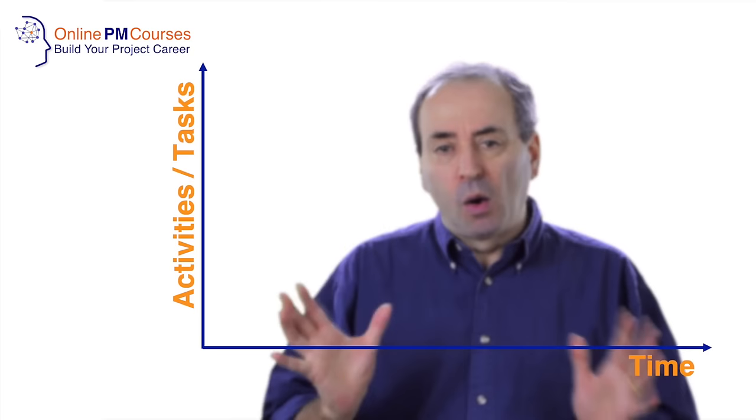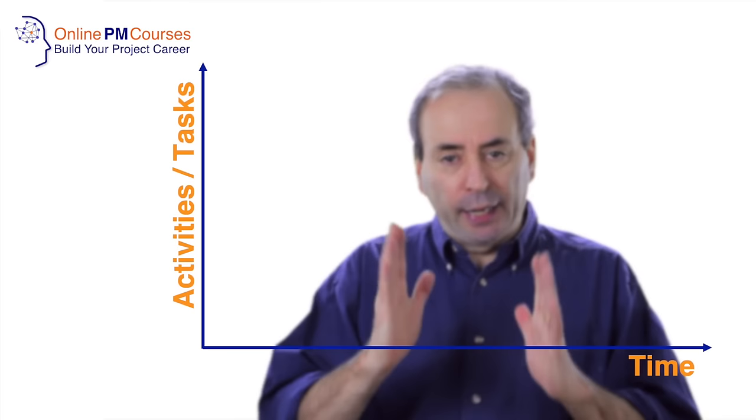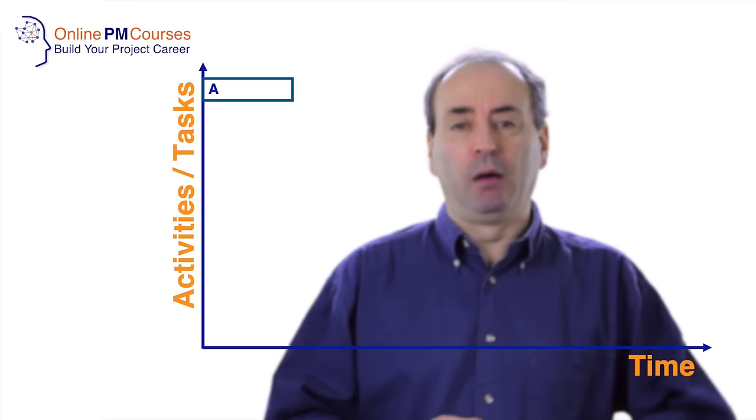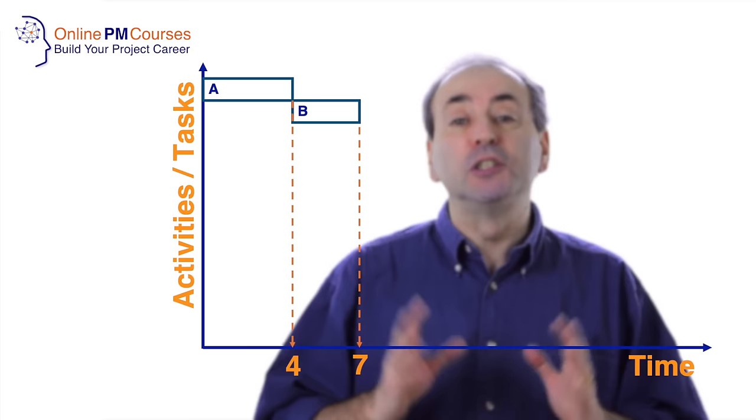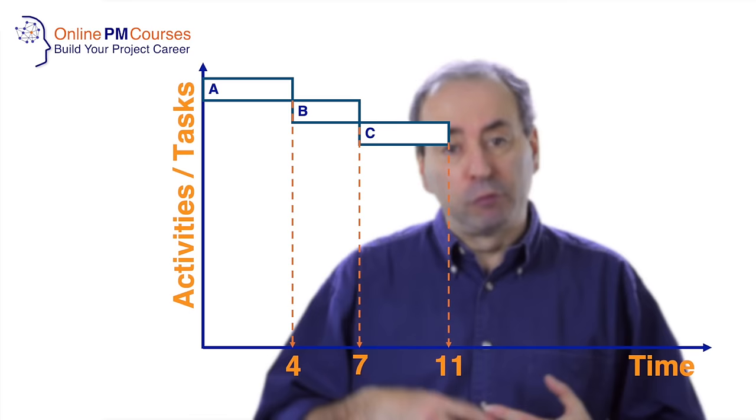Now once you've created your graph—and here's something important about the way Gantt charts work—equal units of distance along the horizontal axis represent equal units of time. Once you've created that, you represent each activity by a bar. The length of the bar represents the duration of the task, and the positioning represents the scheduling.